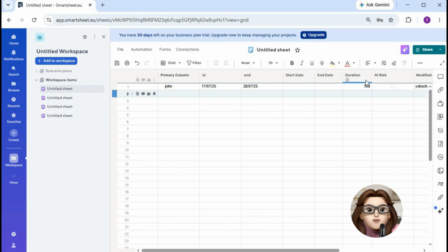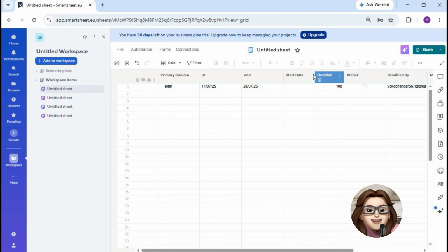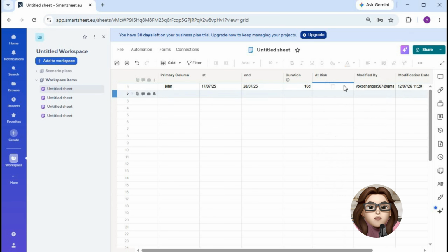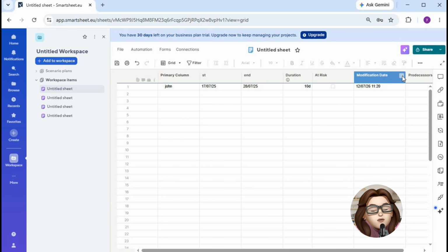If the same holidays apply to everyone on the project, choose the option to apply these settings across the entire project schedule. After entering your holidays and weekend settings, review everything carefully to make sure the dates are correct. Click Save or OK to apply the changes.